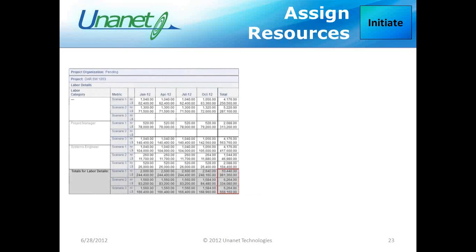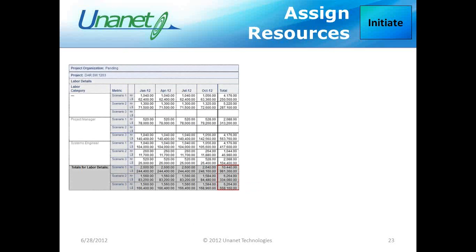I may create several of these what-if scenarios of resources, each with maybe completely different people, or maybe some people are the same, but others have different availability or different costs and bill rates. And then I can select these plans and compare these plans based on labor cost with the plan set comparison report.